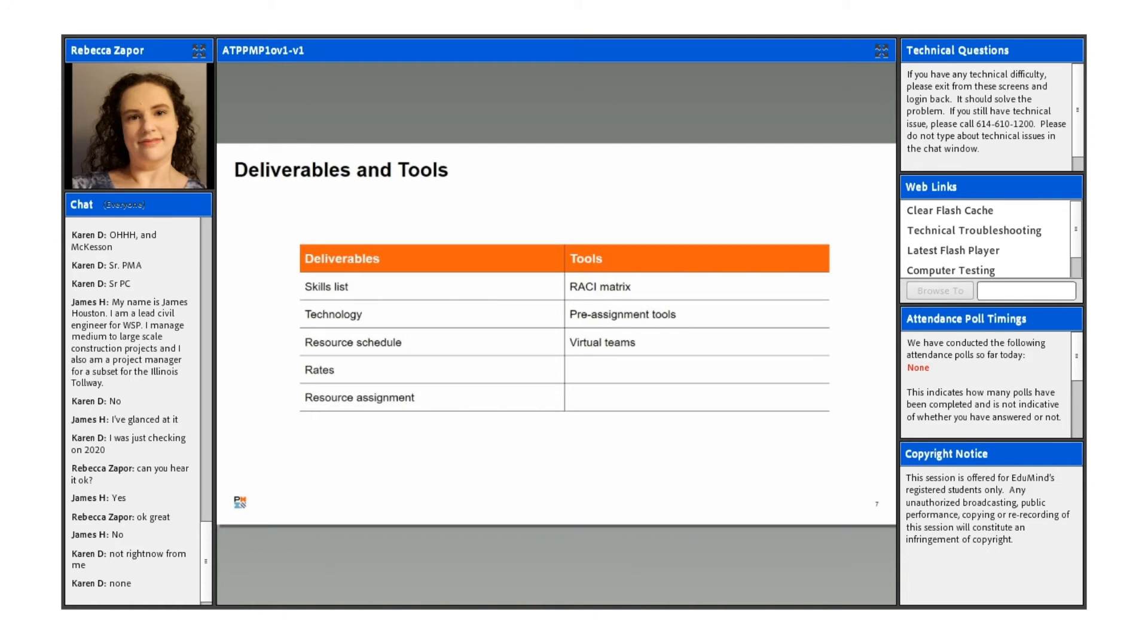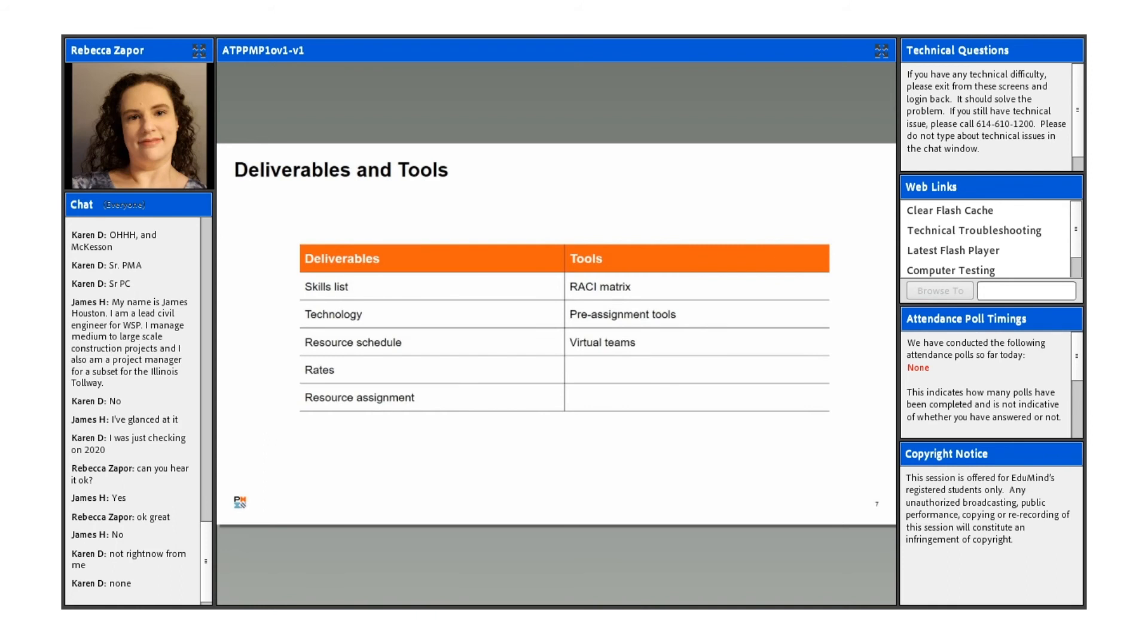So when we talk about this topic, some of the deliverables that we would have here would be like a skills list or a resource schedule, a resource assignment, any rates or technology that would be required. And also for the tools, you would be able to use things like a RACI matrix, pre-assignment tools, or virtual teams.